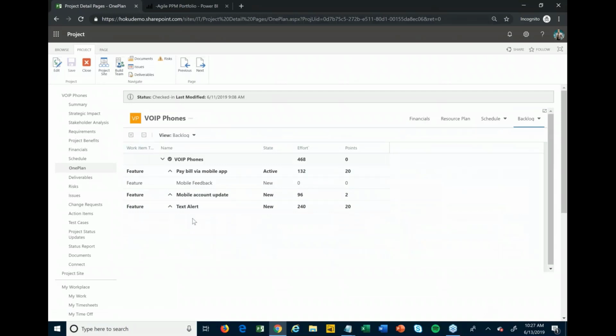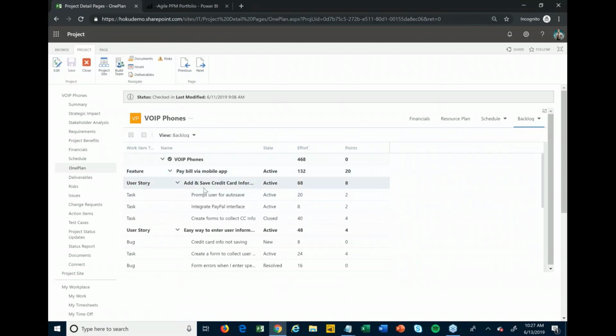Just like I could go into Project Desktop, build out my schedule and publish it in, I can go out to Azure DevOps, build out my backlog of my different features broken down into user stories, tasks, bugs, etc., and let that all roll back in so I still have a view of all of the detailed work that's been planned, and then let that roll all the way back up to the project and into the different reports and dashboards and such that we'll see in a second. So that's more from the project manager and/or scrum master or whoever's really managing this project from a resource, financial, and schedule perspective.